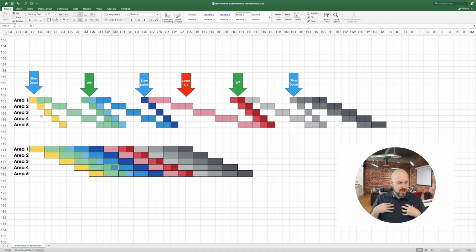That's what I've found. So what do we do with the rest of the time? I've found that there are a ton of different ways. We could talk about prefabrication. We could talk about pre-kitting. We could talk about pre-cutting or building some of the work outside the building and then bringing it in to the actual space that you're going to be working for those other 2 times.